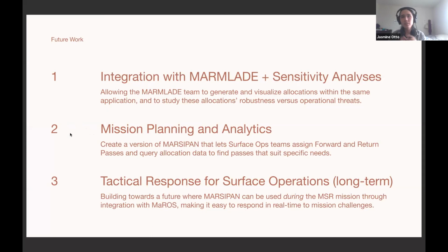The next scenario we see is going out to management and surface operations, thinking about the mission months in advance, figuring out which sols you can genuinely operate on, and using the schedule representation to see where you can squeeze in a little more performance, where you know you don't really need the full decisional return on this sol, so you're going to staff it to that day anyway, or seeing when you can get away with staffing everyone on Earth time because the operations window happens to line up perfectly.